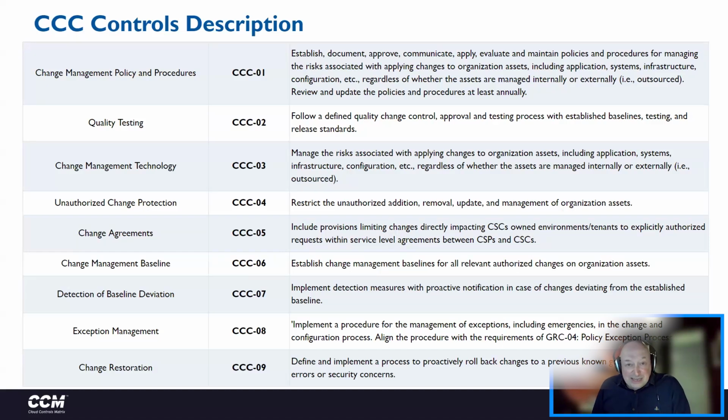Now, being the real world, things happen outside expectations. So you need exception management for that. Emergency changes, a sudden agile response to a changed situation, will likely need a managed change that can't be booked days in advance. It needs to be done on the spot as fast as possible. So that's why there's an exception management process.